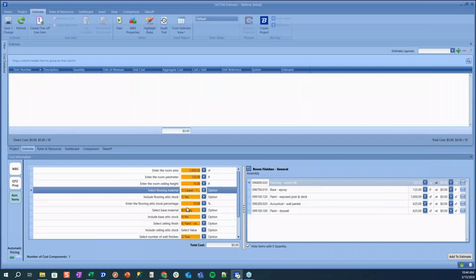Then that would turn on the correct line item, and our line items have 5 cost categories: labor, material, sub, equipment, and other. So we could have a material cost there along with either a labor unit cost or a crew for productivity.